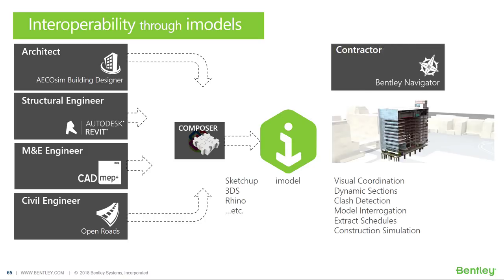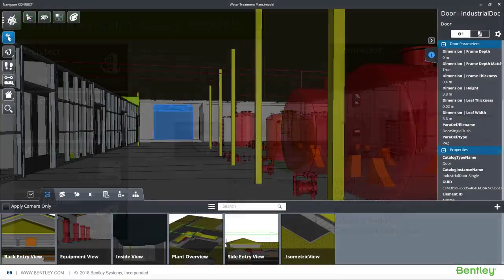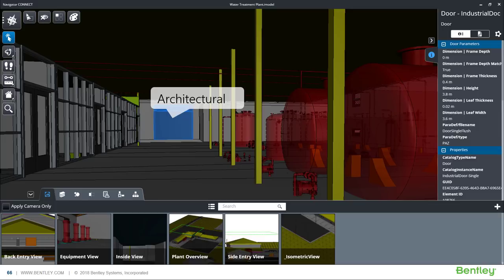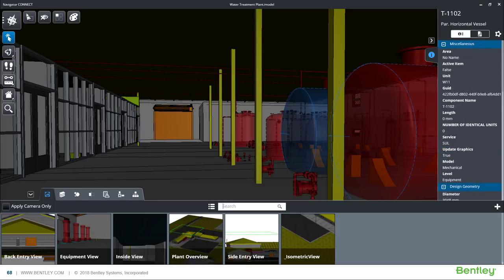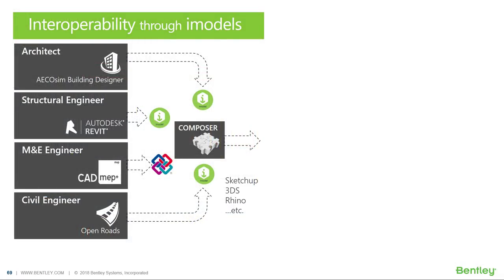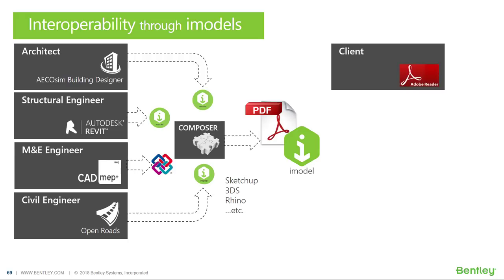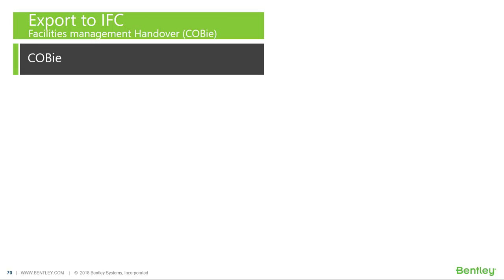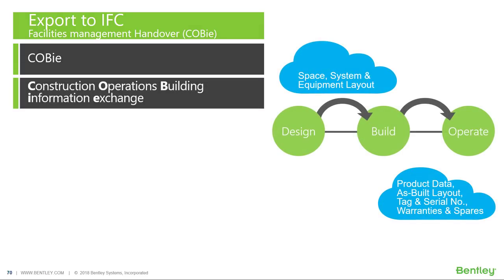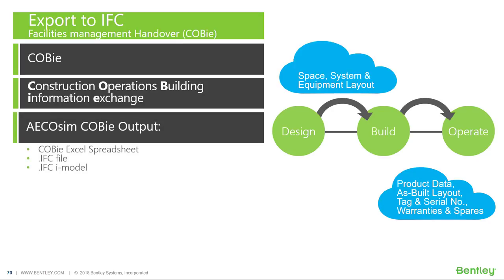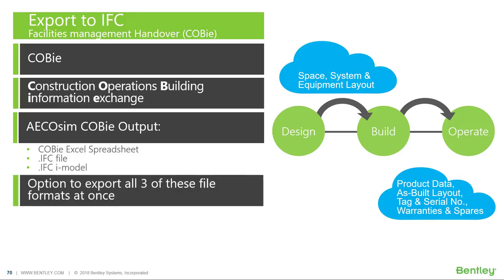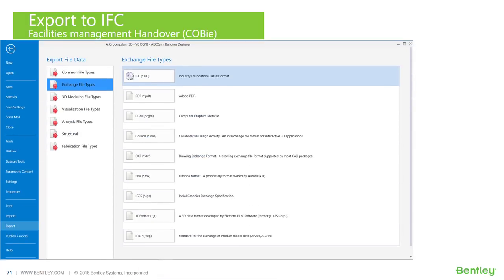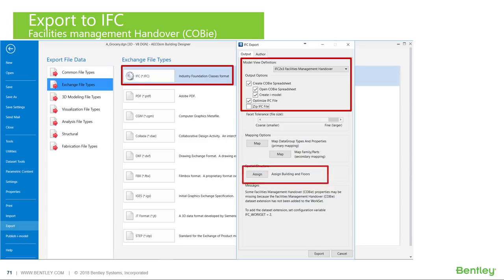People can view iModels through Bentley Navigator for contractors or vendors. In Bentley Navigator, you can select different disciplines in a particular iModel, such as architecture, structure, or even plumbing. For clients, we can follow the same method and generate 3D PDFs for review. Based on the IFC facility management handover model view definition, COBIE is an information exchange specification that captures data during design, construction, and commissioning for operations and management. Ecosim has an option for COBIE Excel spreadsheet, IFC file, IFCI model, and also the option to export all three file formats at once.